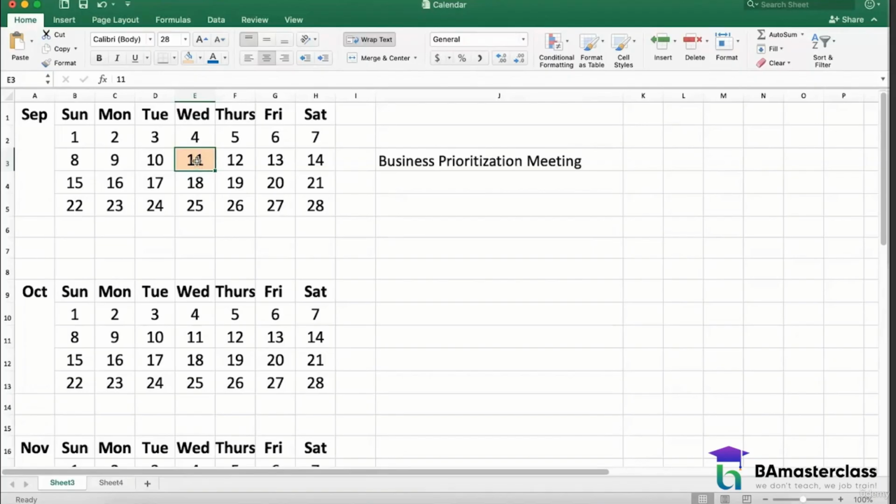For which release? Will it be September 28, October 28, or November 28? First was September 28th. Okay. So now I'm not going to be asking them the priorities of September 28 because I'm already in the middle of this release. If I'm meeting them on September 11th, I'm going to ask them, what do you want to get delivered on October 28?